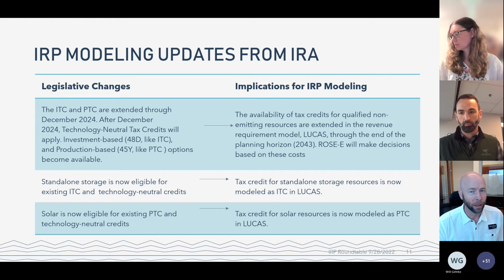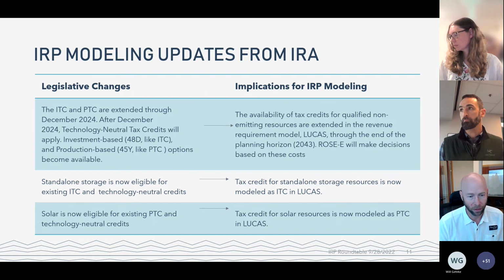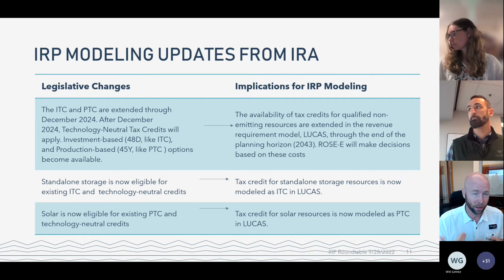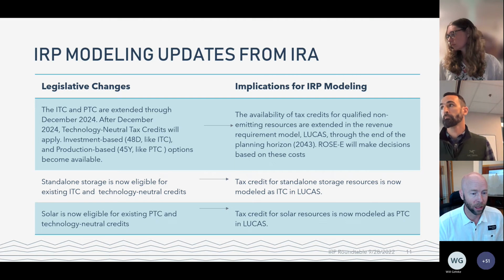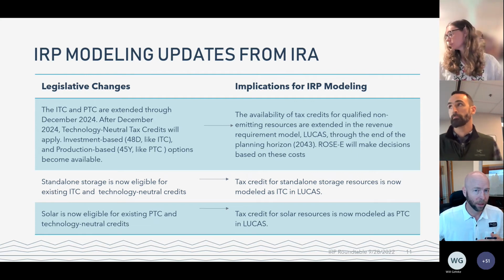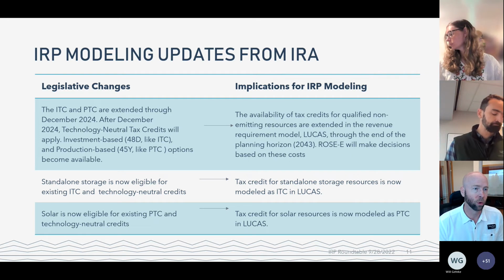But one of the things that jumped out is that the PTC expires, and if it wouldn't exist in say 2027 or 2037 or 2038, it really shines a light on the timing of the transmission upgrades that you would be relying on in an IRP. We keep talking about the timelines of NEPA and permitting these transmission lines, but if you're assuming a transmission line would be online in 2035 and it actually probably wouldn't be until 2040, that would change what appropriate procurement strategies are, and we need to make sure that gets incorporated.